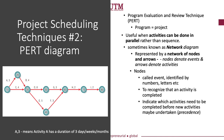Please take note that the arrow has its own specification. For example, the arrow between node 10 to 20 is labeled A, 3. That defines that from node 10 to node 20, activity A is conducted for a specific time duration — for example, 3 days, weeks, or months. The PERT diagram is effective to visualize project planning with concurrent or parallel activities, whereas the Gantt Chart is the best technique to visualize sequences.